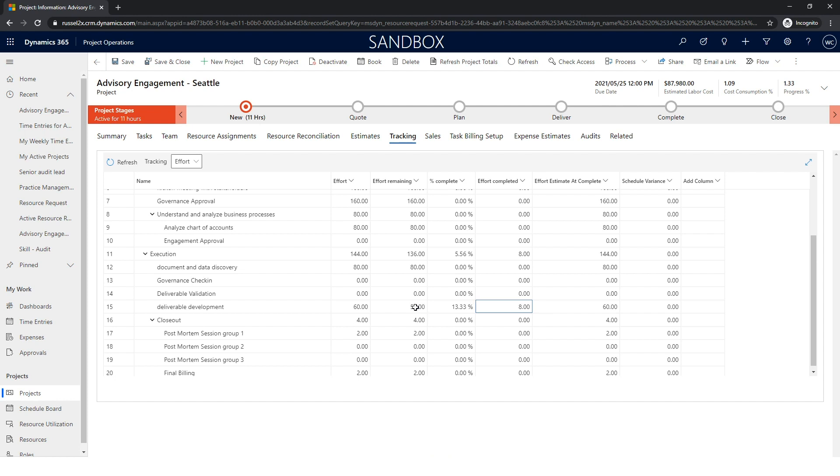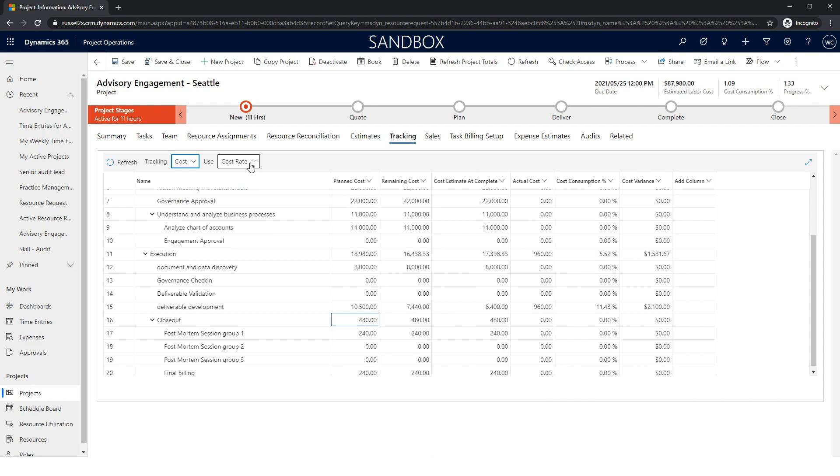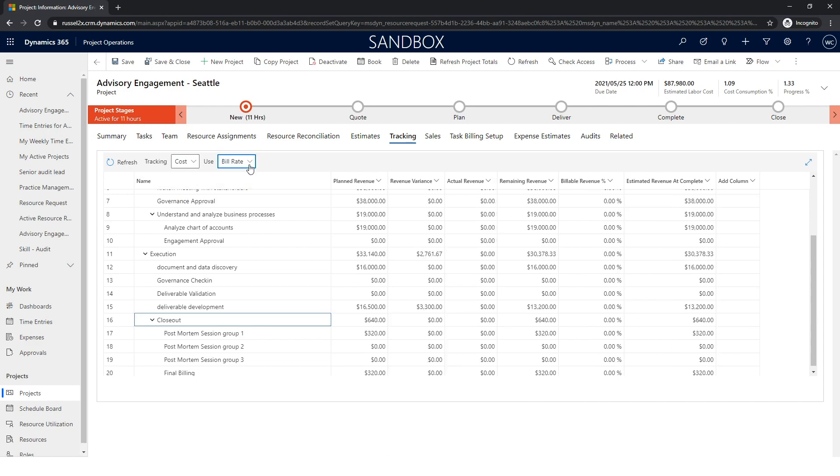PMs can adjust the remaining effort to accurately represent the estimate at completion, and for time and material projects, this also influences the associated revenue for each line item.